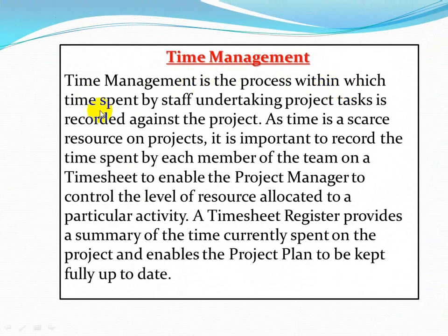Time management is the process within which the time spent by the staff undertaking project tasks is recorded against the project. As time is a scarce resource on projects, it is important to record the time spent by each member of the team on the timesheet to enable the project manager to control the level of resources allocated to a particular activity. A timesheet register provides a summary of the time currently spent on the project and enables the project plan to be kept fully up to date.